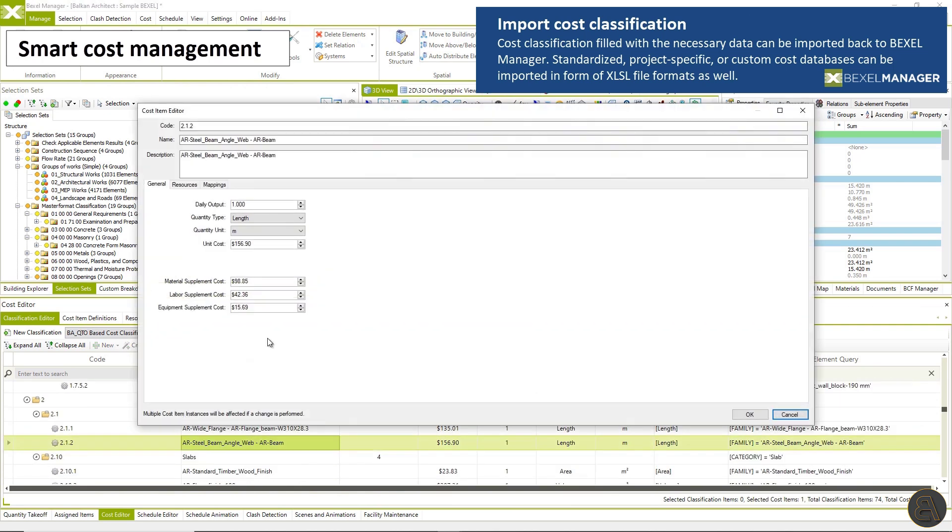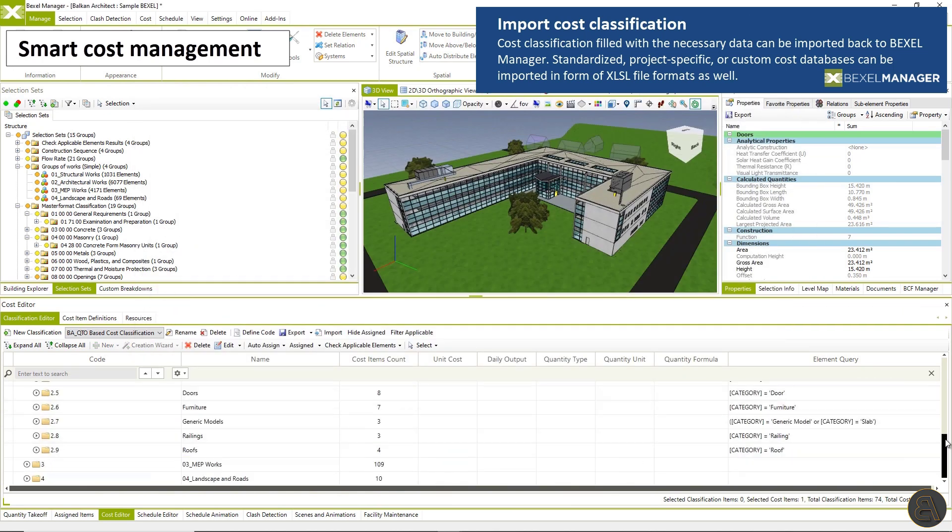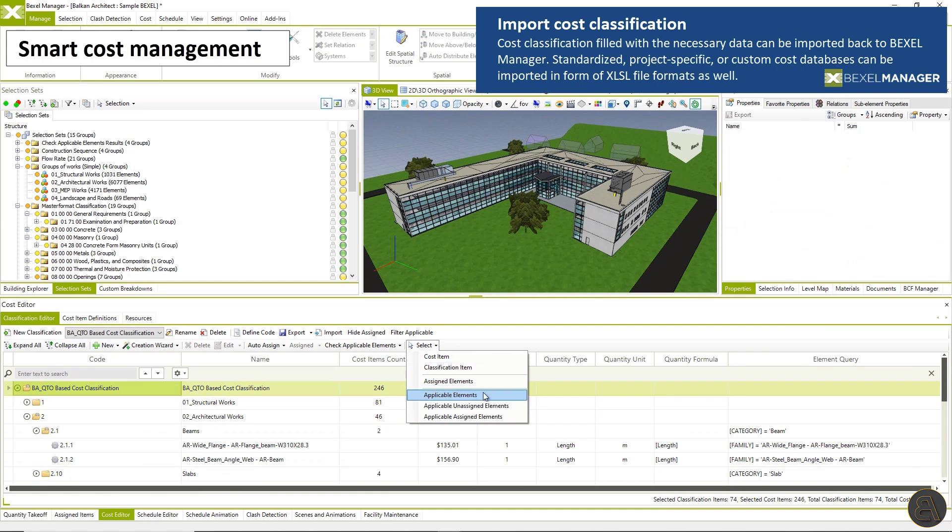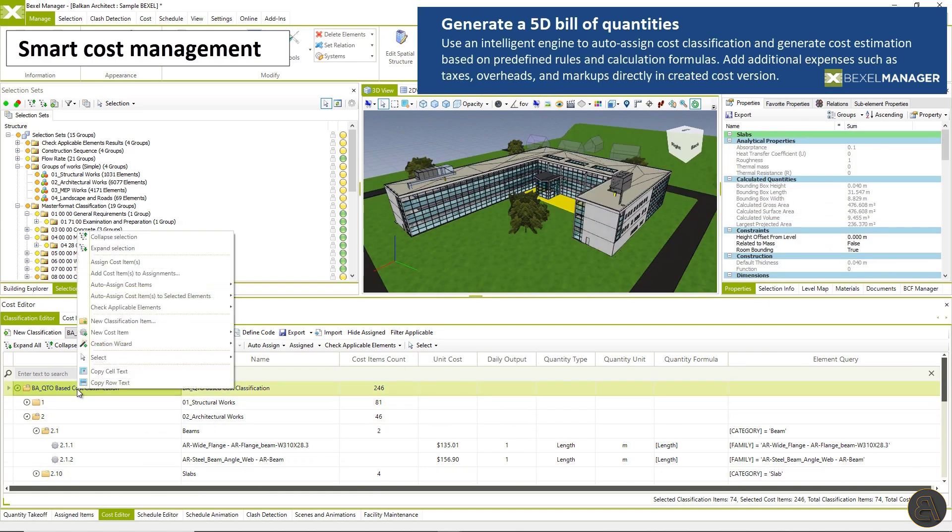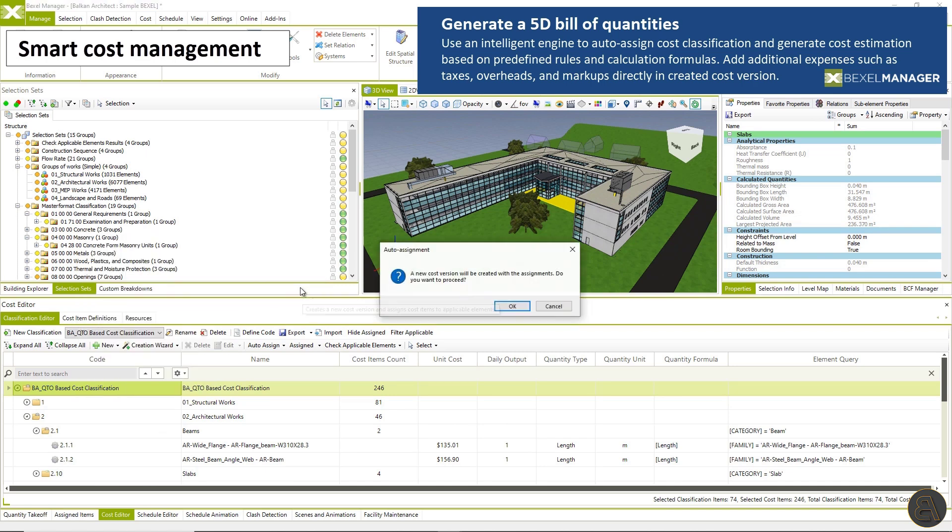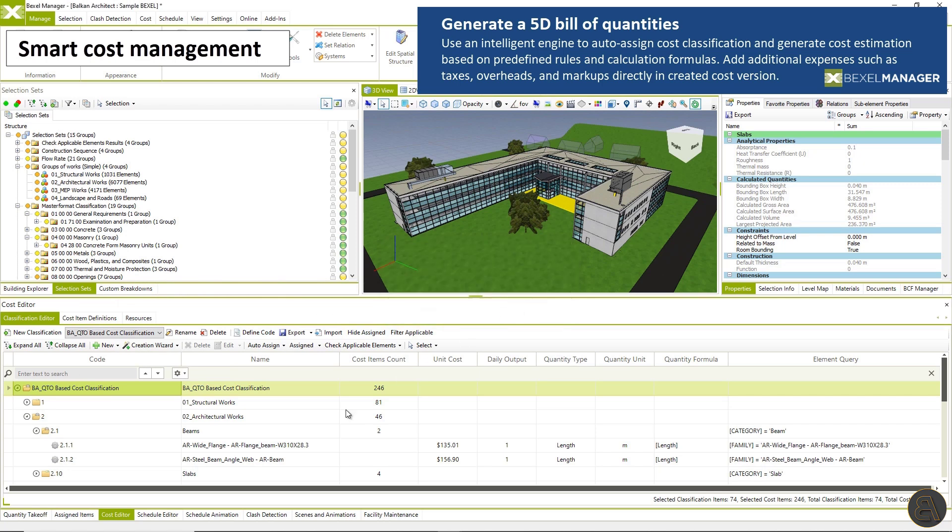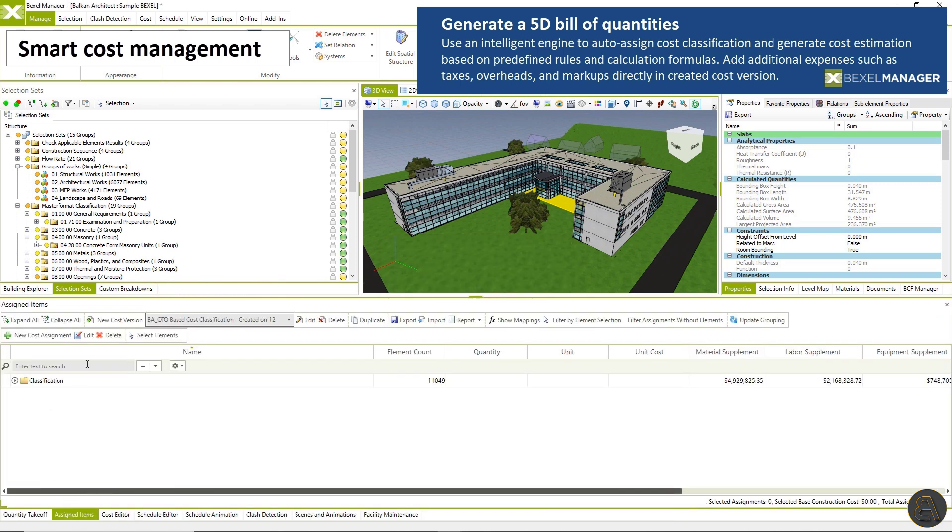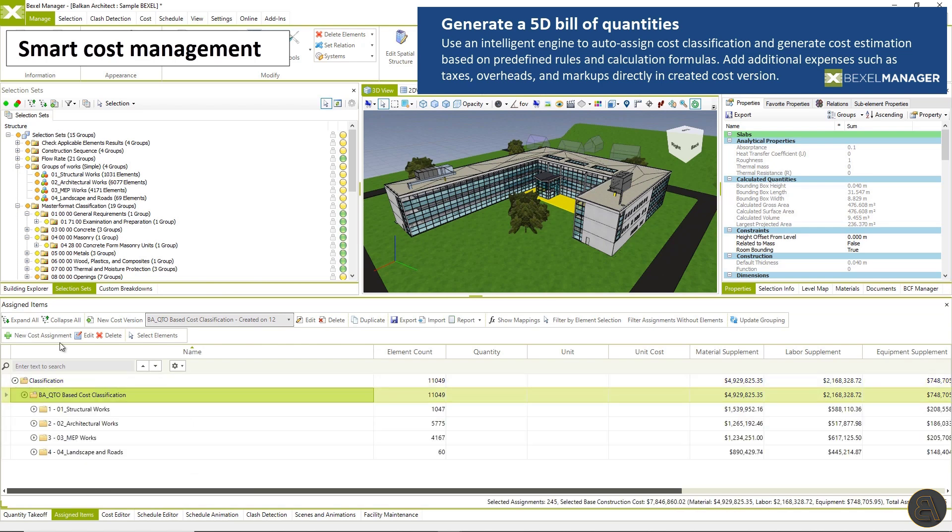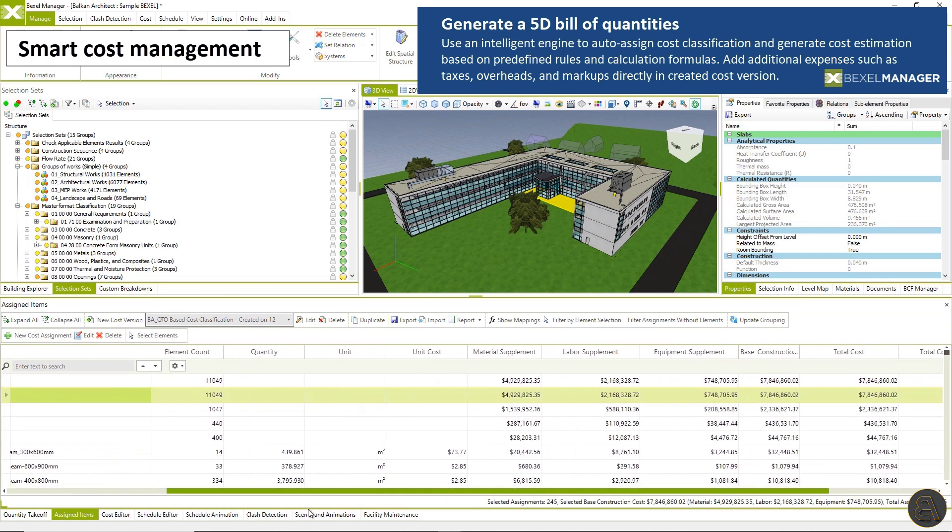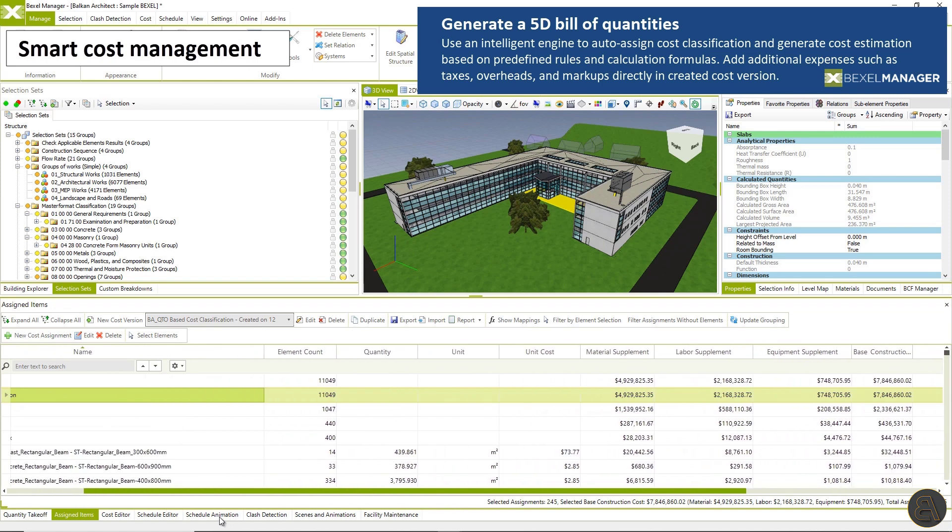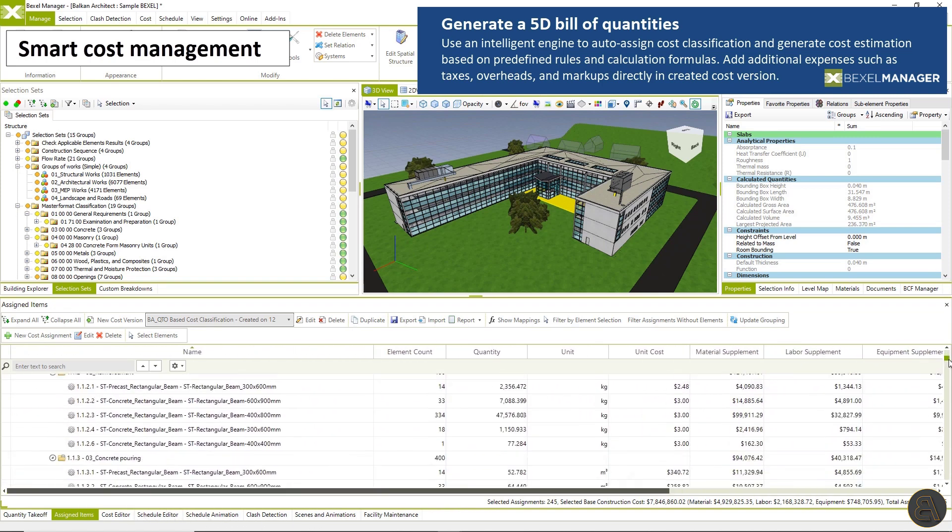Standardized project specific or custom cost databases can be imported from Excel file formats as well. Finally, use an intelligent engine to auto assign cost classification and generate cost estimations based on predefined rules and calculation formulas. Add additional expenses such as taxes, overheads, and markups directly in created cost version.